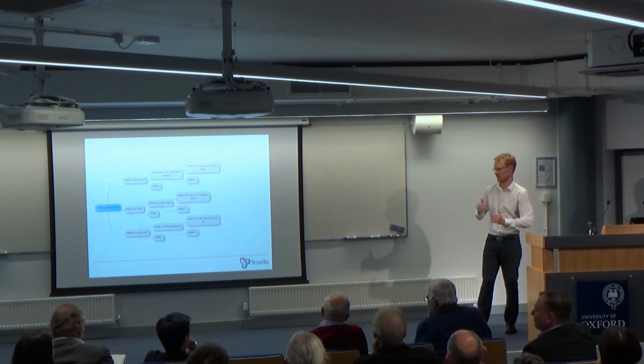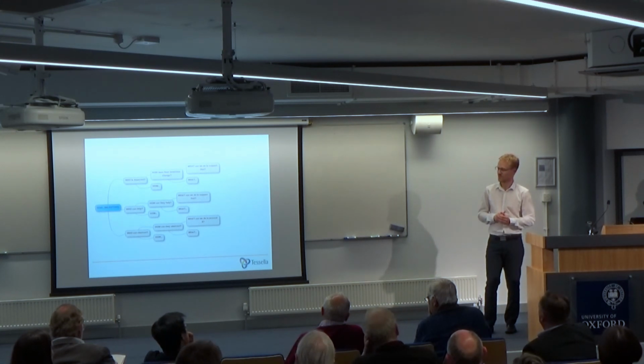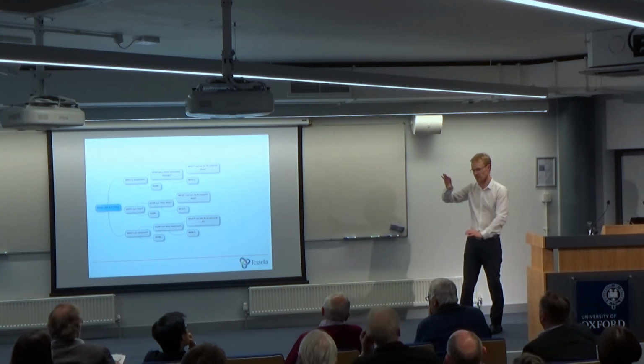They want stuff, right? And there's a big problem when you prioritize your backlog. You're going to have some must-haves, some nice-to-haves, and then some maybes, if we have time. So priority 1, priority 2, priority 3. But must, should, could is also how people frame this: the must items, the should items, and the could items. You have a problem if your list of must items is as big as the budget, because there's no flexibility, and they'll try to get more because they want more for their money. But again, they are thinking in terms of output.